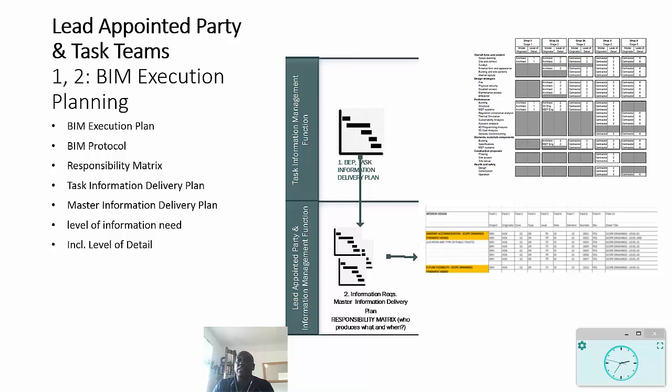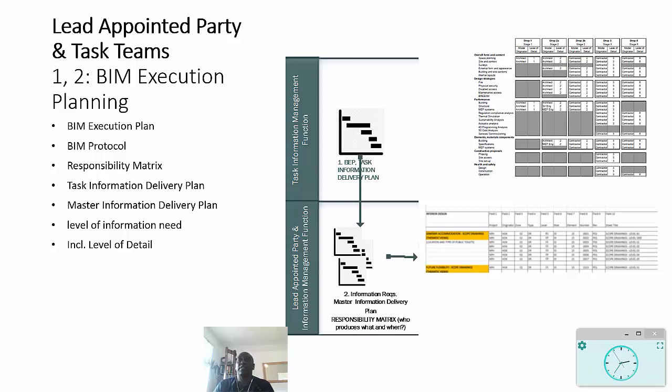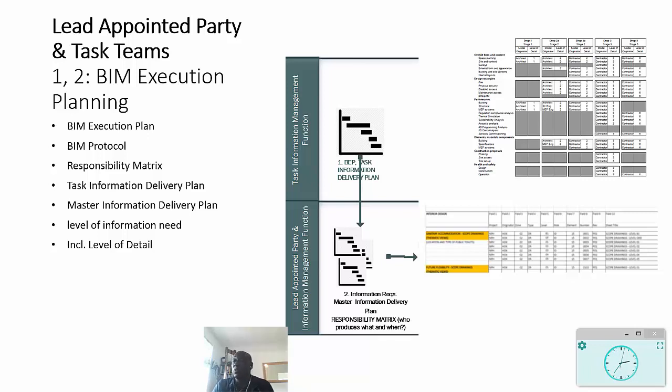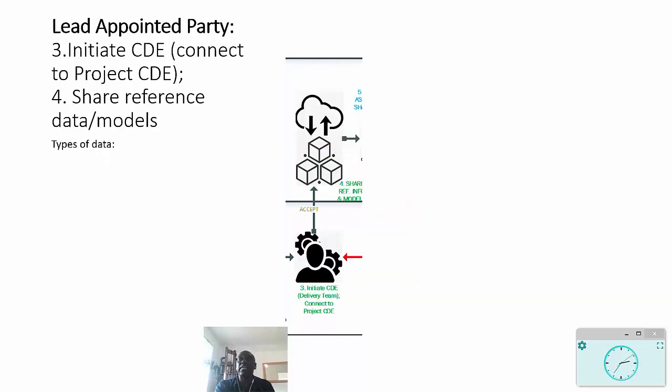Those are all rolled up together into a master information delivery plan, which gives the appointing party visibility of all the information that needs to be produced, and that needs to be in accordance with that information level of need, which includes the level of detail. Moving on swiftly with this, the next thing to notice...